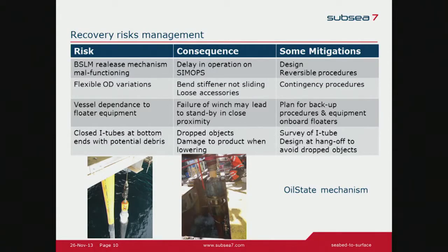Mitigation is a bend stiffener latching mechanism with a proper design, suitable to be reused 20 years after its first installation if the lifetime is 20 years, and also reversible procedures in case we are stuck with this system not working. That will allow us to get a bit further away from the floater.